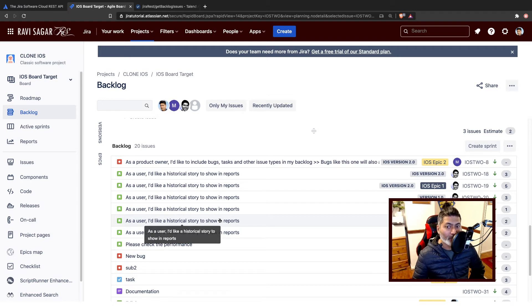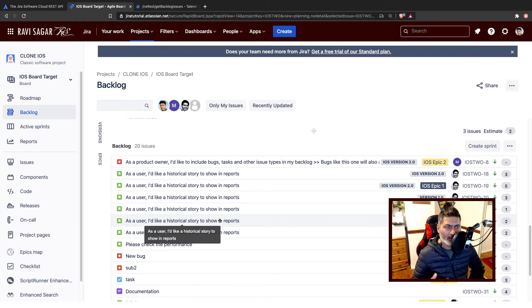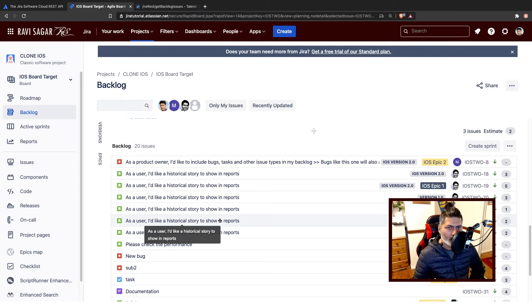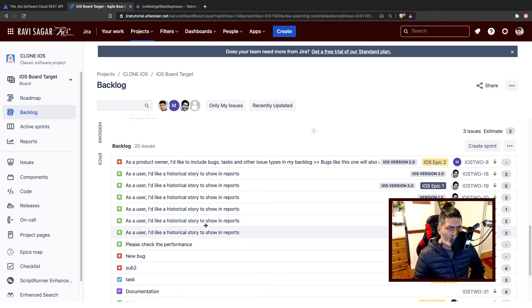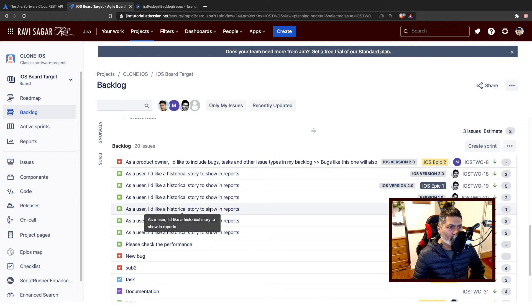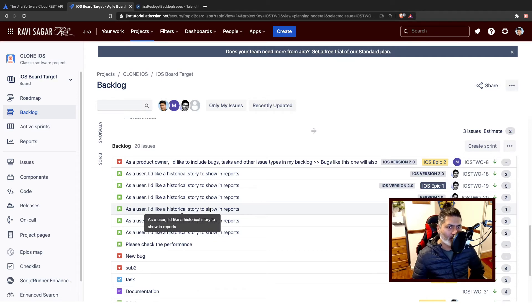But you may not have yet prioritized them, or you may are still in a process of defining the rank, like which activity to be done first. So usually your scrum master along with product owner and along with your team members, they will probably perform this backlog grooming.